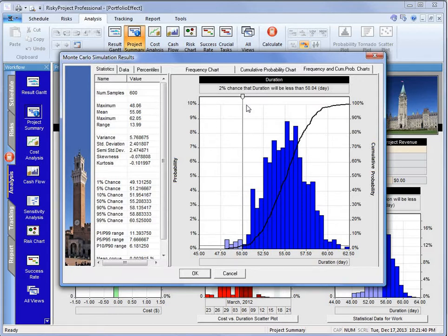And this is very typical for what we see, especially when we get a first forecast, the original forecast, where they put the schedule together, and then they haven't yet run a simulation to find out what the chances are that they'll make it. They haven't made adjustments. And one of the things we can see is this fairly steep S-curve.